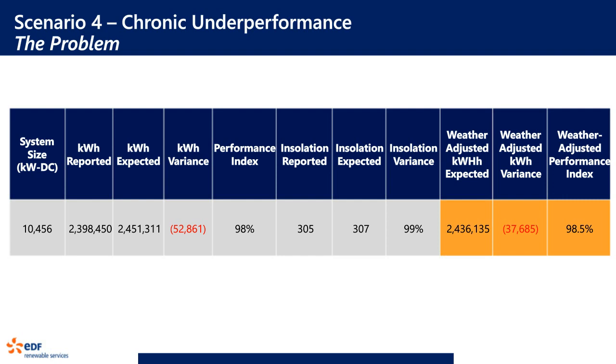So at this point, we went back, pushed the numbers, right, and assumed what a 1% loss looks like over a period of 3 years, right? Figured out what kind of money this is, and really said, okay, we need to understand what's happening and find ways to adjust, because ultimately you're either going to have to adjust your expenses or get your performance back up. I mean, ideally you want to maximize both of those. So in this case, we came up with a number that seemed reasonable, and then started talking about what we can do with that.